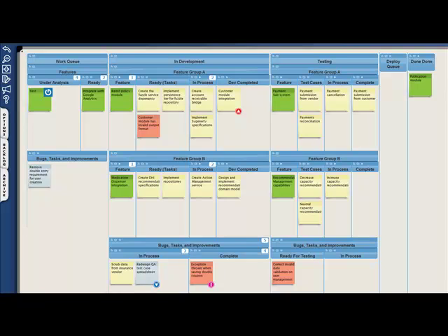Before we take a look at the analytical tools, let's take a quick look at this fictitious value stream to understand what we'll be analyzing. As you can see, this value stream maps out the processes necessary to complete work items through a development process. Features, or MMFs, are queued or buffered within the work queue to the left. As capacity of the system becomes available, they are pulled into development where they are broken out into individual tasks. Those tasks are processed through completion.